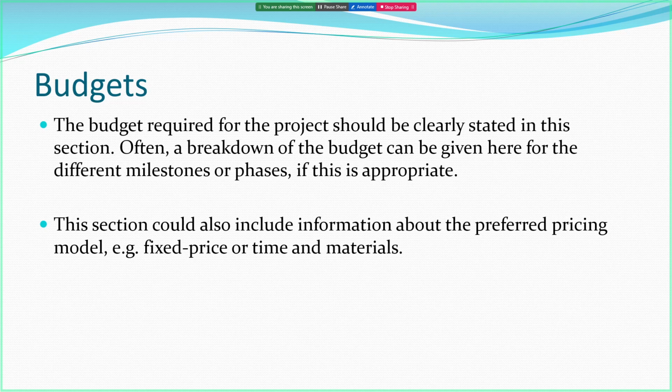So that's called a variation. What you need to be aware of if you do a variation is it's going to cost more money and more time. And it needs to be put into the paperwork as well. Why do I bring it up here? Because it affects this thing here called a budget. Okay? Companies do have a limit on their money.